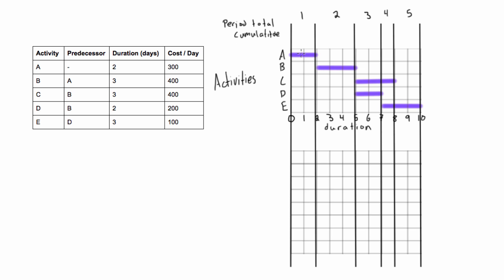In period one, the only activity happening is activity A, which costs $300 per day. Over two days, the period total is $600, and the cumulative cost is also $600. In period two, only activity B is happening at $400 per day over three days, giving a period total of $1,200. The cumulative cost becomes $1,200 plus $600, giving us $1,800.